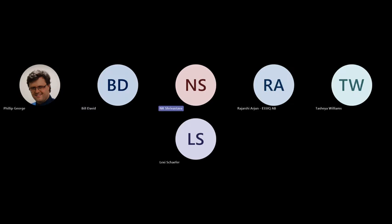when you release a feature or you release an epic, then you're releasing all the stories with that. So you're not releasing them independently. Even if you have finished stories, you're not going to release them until the epic or the feature is done. So it is okay to do the value points at the feature or epic level, whatever you are going to put in production. That's important, because it cannot be used before you put it into production. It may be production ready, but you still may not be able to put it in production. So if your stories are very small and it doesn't make sense, then you can do it at the epic or feature level.